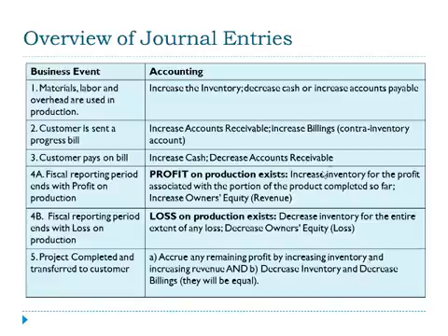During the fiscal period when we have a profit, we're going to recognize the profit by increasing inventory and increasing owner's equity. If we have a loss, which we have not illustrated yet, we are going to decrease inventory and decrease owner's equity. So it's exactly what you would think would happen. When the project is completed, we will accrue any final profit to be recognized, and then transfer the title to the inventory over to the customer by decreasing inventory and decreasing billings.